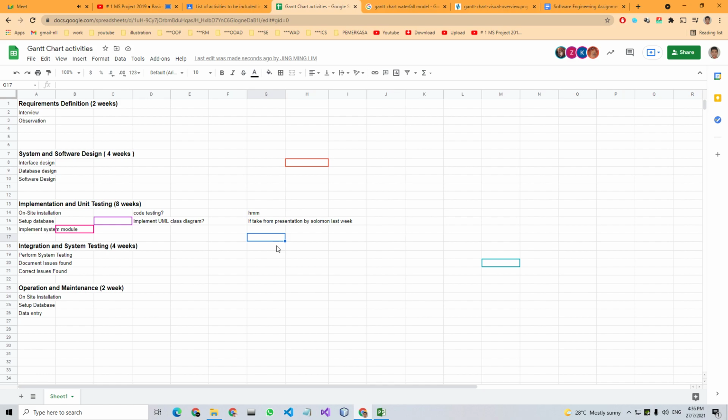So should I use the project manager as the same one person for the communication for all the modules? One project, one project manager. I think you only put the project manager at the Tanaki engineering system, the top one. No need to put the project manager in each of the modules, because there is only one project manager for one project. Your project is only Tanaki engineering, right? Yeah.